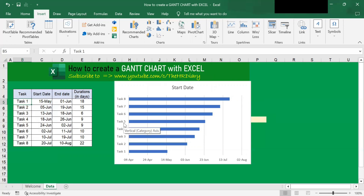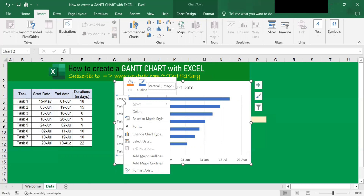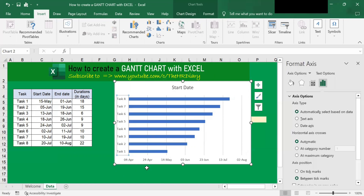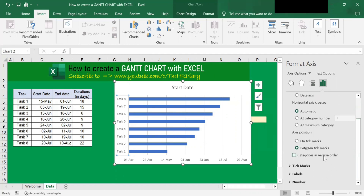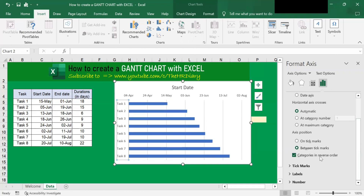To put them in the same order, right-click on the vertical axis label and then select Format Axis. Then go to Axis Options, scroll down, and you will see 'Categories in reverse order' — click on it. Now the tasks in the chart are in the same order as the table, with task 1 at the top and task 8 at the bottom.